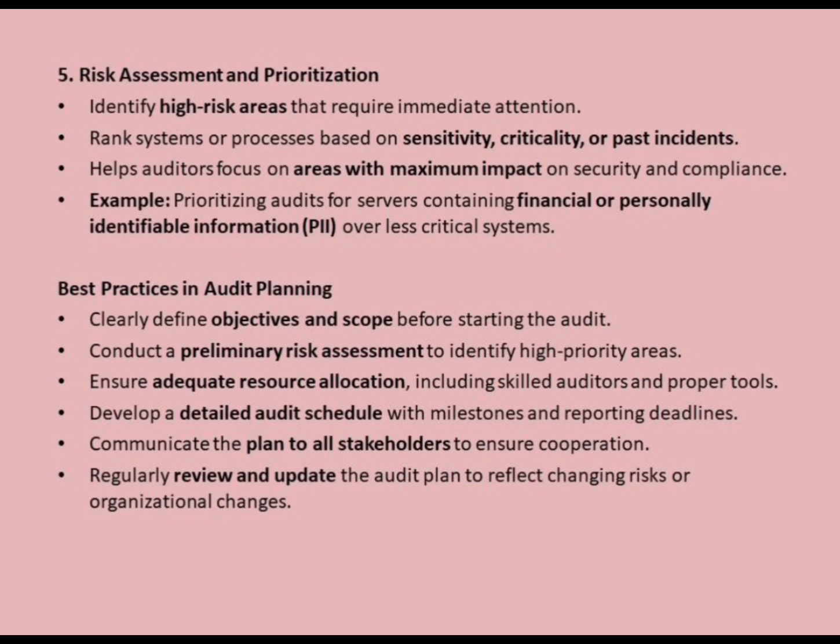Stakeholder communication. Inform departments about the audit to ensure cooperation and minimize disruption. Example, notify IT staff in advance to grant access to servers during the audit period. Regular review and update. Adjust the audit plan when risks, regulations, or organizational changes occur. Example, updating the plan if a new cloud service is introduced that stores sensitive data. By following these best practices, auditors can systematically identify, prioritize, and mitigate risks, ensuring that the audit is efficient, effective, and aligned with organizational and legal requirements.